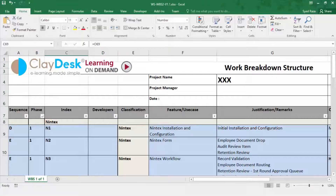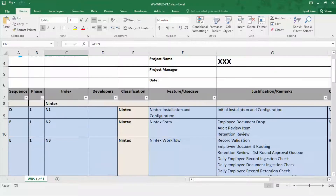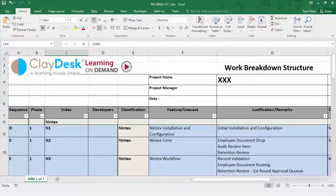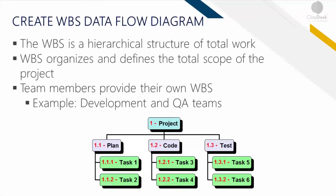As a homework assignment, go ahead and search the internet and download different WBS templates, because these are customizable — this is our version, but you can use any other WBS format. If you have any questions, post them in the discussion area and I'll be happy to see what you actually find yourself. So let's go back to our slides. The work breakdown structure is simply the process of subdividing project deliverables. Here's a simple WBS data flow diagram — it is a hierarchical decomposition of the total scope of work to be carried out by the project team to accomplish the project objectives and create the required deliverables, exactly as demonstrated in the Excel sheet.